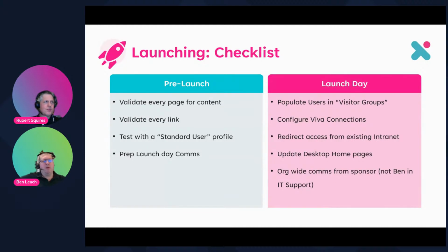Yeah, I think just very quickly, one step we haven't mentioned is, once you've defined what your content is going to be, we advise our customers to prepare a content spreadsheet that the project manager supports people to ensure it gets populated. When you've thought about all those questions that Rupert's talked about, compile that into a spreadsheet that forms your content plan in that project launch. People set aside the time to go through and do that content, and it doesn't feel quite so overwhelming. It can be broken down more easily.